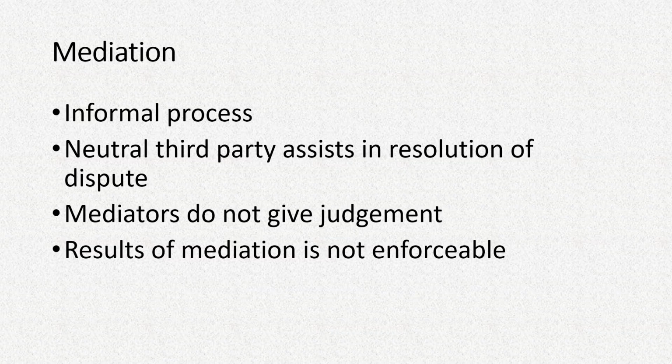So therefore it's a very informal process, and generally for small disputes, both parties try to resolve the disputes in this stage itself, because it's quite quick and simple. But sometimes if the solution is not acceptable to one or both of the parties, in that case we go to the next stage or next level, which is arbitration.